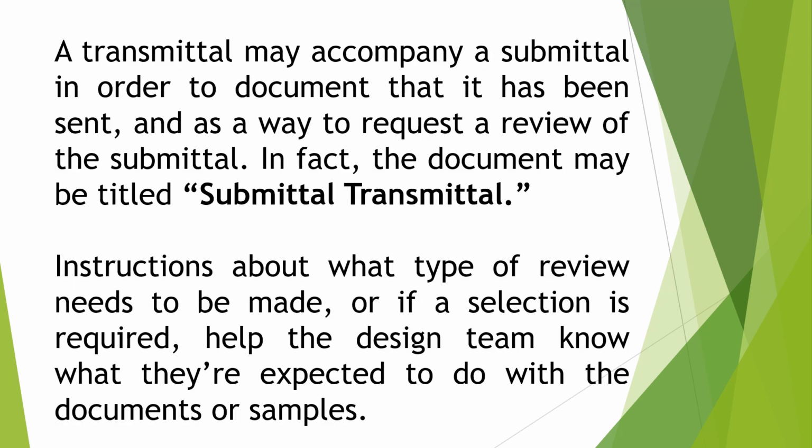A transmittal may accompany a submittal in order to document that it has been sent and as a way to request a review of the submittal. In fact, the documents may be titled Submittal Transmittal. Instructions about what type of review needs to be made, or if a selection is required, help the design team know what they're expected to do with the documents or a sample. A transmittal must consist of original documents and a copy for proof of receiving, stamped with the date of receipt of documents.